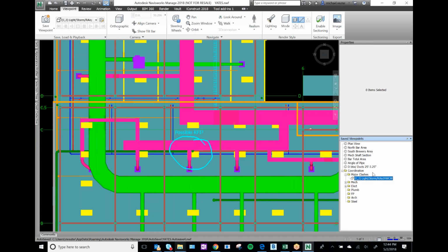The idea is, if this needs an RFI, then I put RFI on this, so I know that. Once we write the RFI, I know this is RFI number 002, whatever, and I've got that noted. Once that RFI comes back, then I can tell people, okay, here we go, right? Does that make sense? Any questions? That's pretty much it for me.